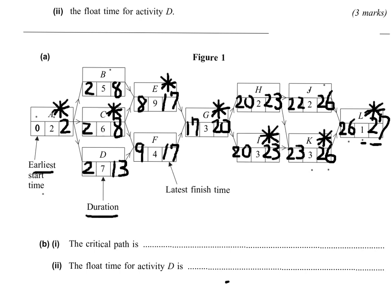I now marked all the critical activities with stars. So let's find the critical path. The critical path follows critical activities, but it mustn't have any break in the middle. It has to flow from the beginning till the end seamlessly. So you would have a path like this.